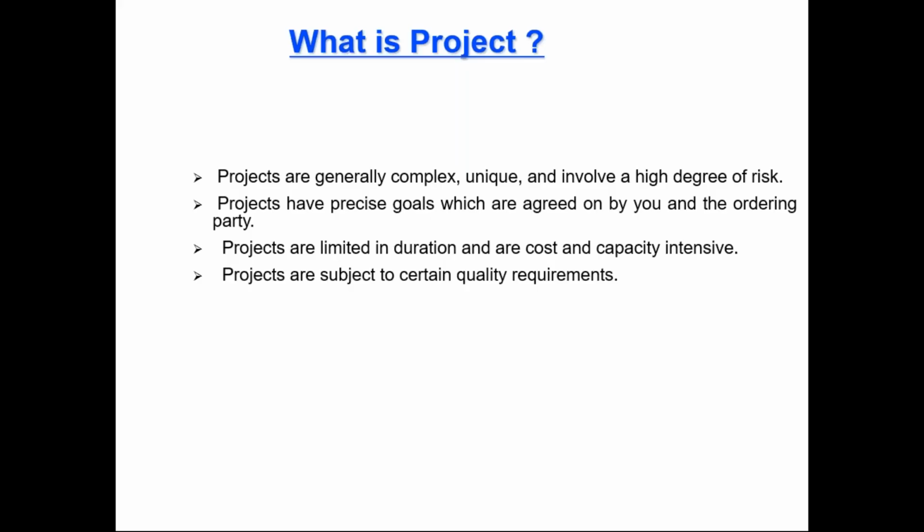Means who is the ordering party, who is the stakeholder from the customer side. So I can say the customer details, my team details who are executing this project, including all the stakeholders. Stakeholders means the people or things being affected by or directly affecting this project, and they have to be mentioned there. The document which has all this information, we call a project charter.